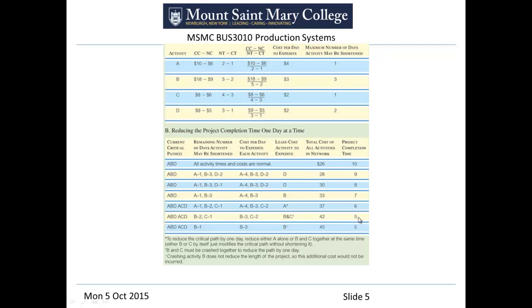And we now are down at about the minimum that we can get. The total process, the shortest we can go to is 5 days, because we're only able to buy the last step. We bought the only available day we could buy from C. So we paid $2 for C. There's nowhere to shorten C anymore. Okay. The only thing left in the system is we can't shorten the overall time in the system.